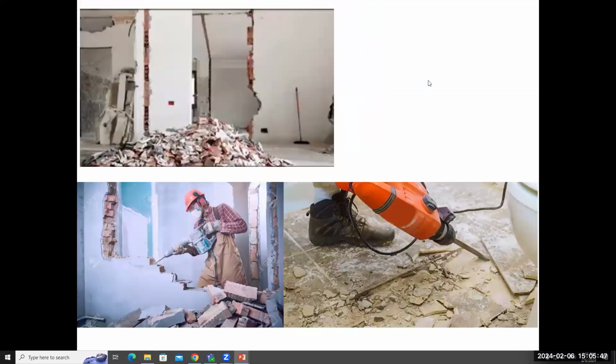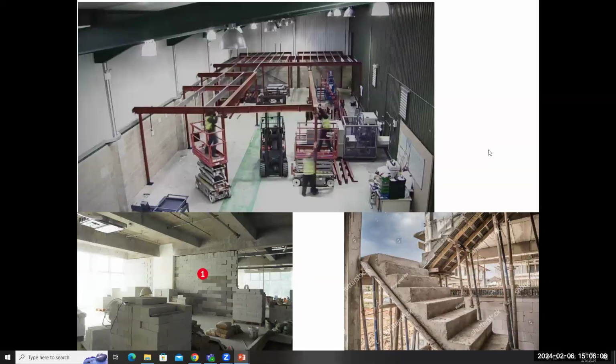Then next thing is done, even in the demolition, sometimes you want to open up things bigger, okay? Bigger window or bigger door. So that everything has to be broken, demolished, has to be done first, then make the construction, okay? That's simple things. You also know from experience.